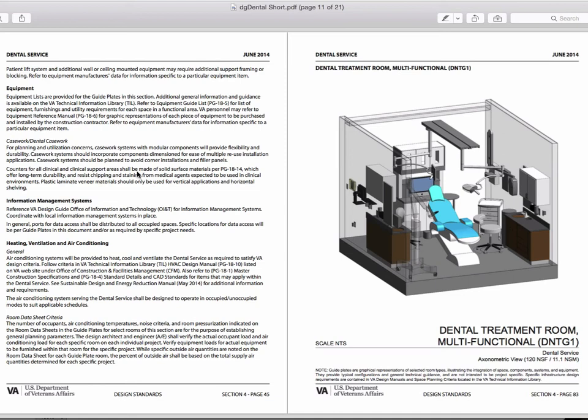So a room like this, we've actually tested over 200 of these ourselves as part of this project. Within a few minutes, 10, 20, 30 minutes, you can actually lay out a room if you have the equipment available and if you have the decisions made, obviously. So the actual mechanics of using BIM are trivial in many ways for a project like this.